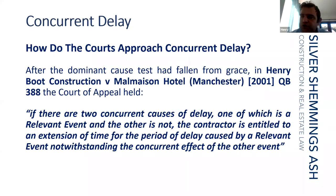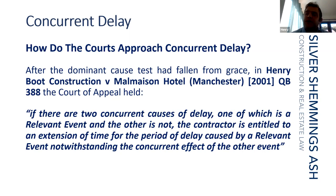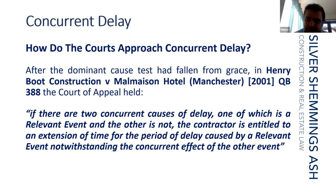The true state of affairs can only be established by looking at first principles — breach, causation and losses. The Court of Appeal is now suggesting that where there are two concurrent causes of delay, one of which is a relevant event and the other is not, the contractor is entitled to an extension of time for the period of those delays. However, this does not mean the contractor can automatically recover loss and expense — that is important. Time and money must be argued separately and distinctly.